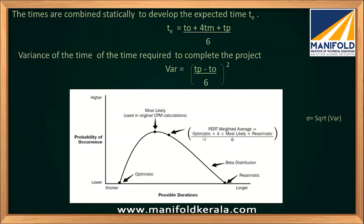In the beta distribution curve, the x-axis shows possible duration and the y-axis shows probability of occurrence. The chance of occurrence is very low for optimistic and pessimistic times, and highest for the most likely time. The variance formula is: variance = ((pessimistic time − optimistic time) / 6)², and the square root of variance gives the standard deviation.